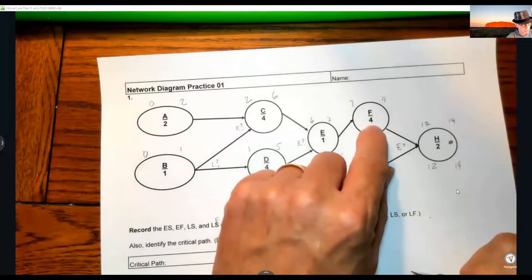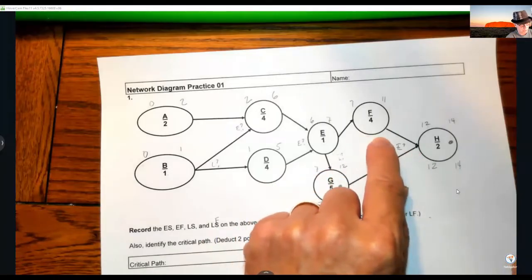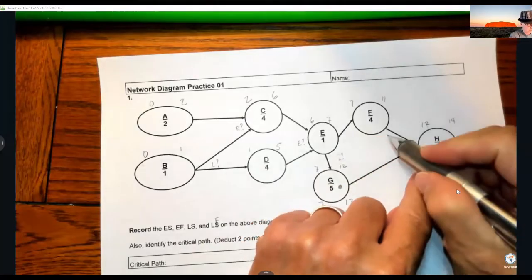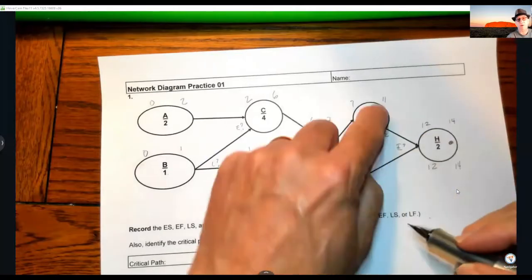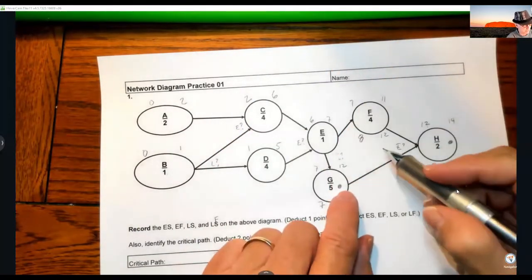This one I have to make no L decision because I remember there's no 2 arrows feeding into it or backing into it. So I say 12 minus 4 is 8. By the way, notice this one's not in the critical path, but you don't have to think about that right now. You can just kind of crunch the numbers.